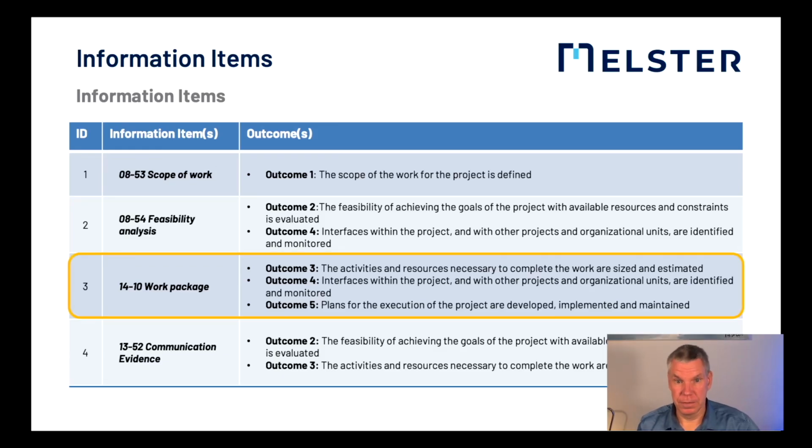Work packages. As I mentioned before, work packages are groups of activities. So the work packages connect the activities by using dependencies. But the work packages contain further information like input and output work products, the resources which are needed to perform the activities which are part of a work package, the effort and the duration.